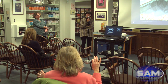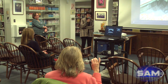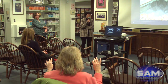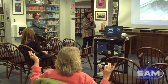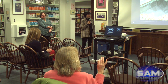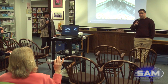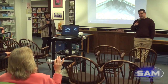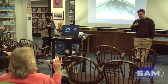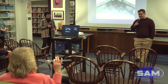I'm asking because I'm on the financial advisory committee. I'm looking at it from the standpoint that you guys need the money. If this does not get passed at town meeting, what's plan B? I would probably have to go to advisory, along with the facilities director, John Parent. There is money currently in the capital plan that covers the 89 addition for the roof, but not for the 1912 historic section, because we were hopeful that this project would pass at town meeting.